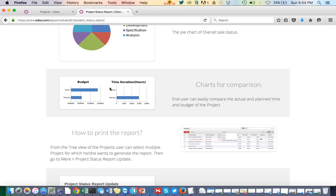For example, if the employee actually spent 5 hours on the task, the actual cost will be 50 × 5 = $250, while the planned amount was $500. The system sums up all tasks, their work logs, and displays the actual and planned time duration and budget.